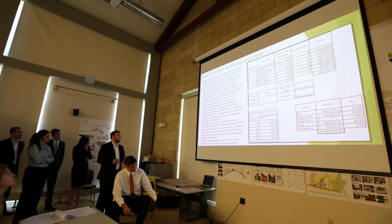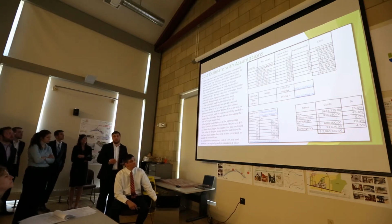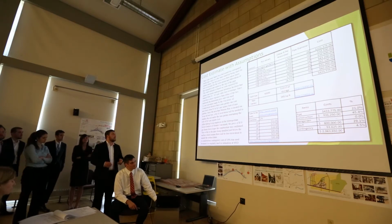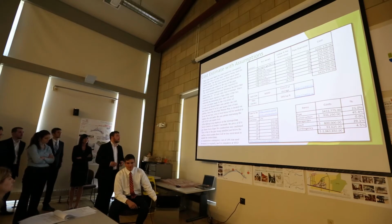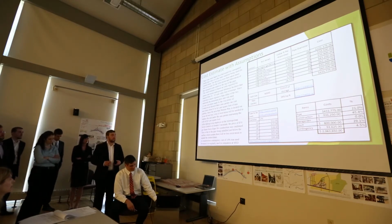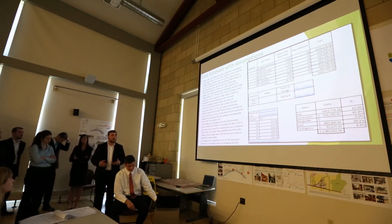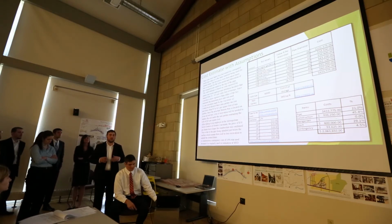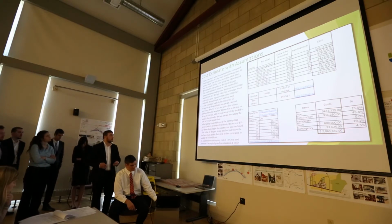And for rain gardens, there was a price range from the University of Connecticut. They had a price calculator for rain gardens, and it was $5 to $45 per square foot of rain garden. We decided to go with the $45 per square foot as the estimate because this is located on the rail line, so there was a lot of bad materials going through, so we need to excavate the dirt and replace it in order to put rain gardens down.